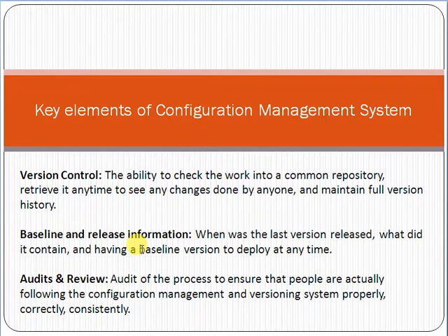For example, you have to give 5 modules to your customer within 5 months. So 5 modules is the baseline for your scope, and 5 months is the schedule baseline. And for example, within the cost of $5,000, so $5,000 would become the baseline cost.